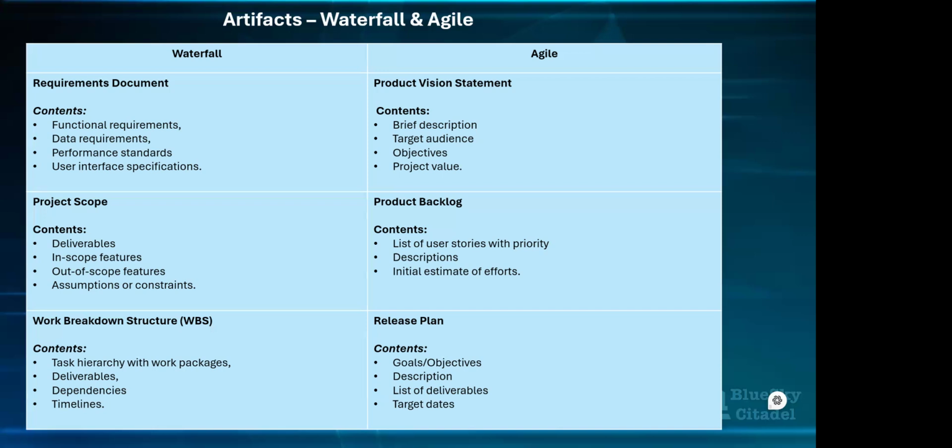So with your work breakdown structure, you're able to see, okay, this task needs to be done. We've arranged it in this format, but it has these dependencies. There's some dependencies that might be system related, system security related, that might be out of the hands of the development team. Maybe they need to meet with the organization's security or infrastructure or the IT department.